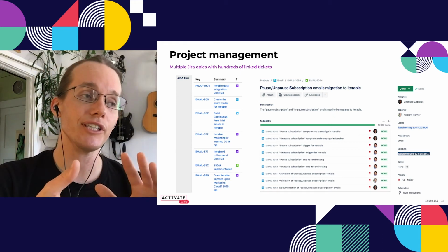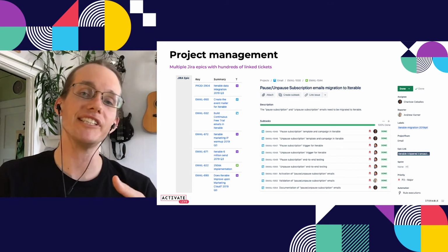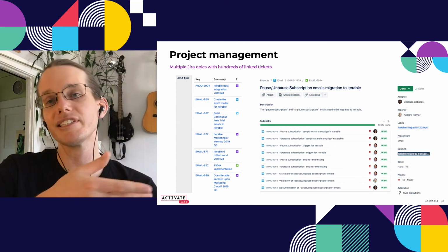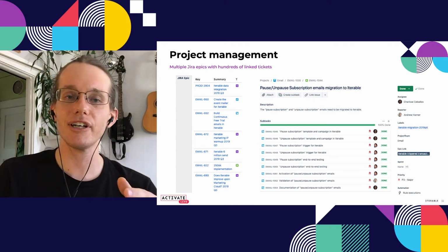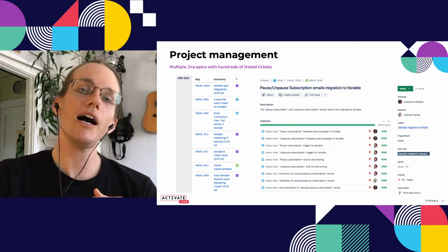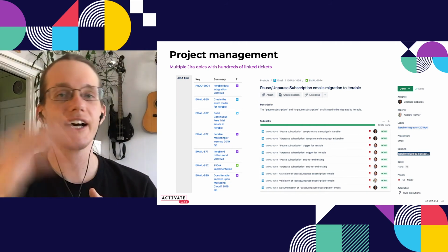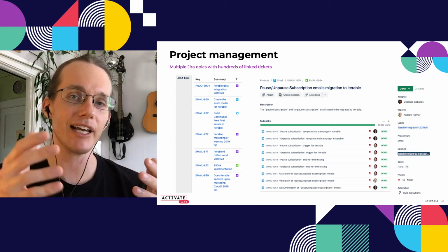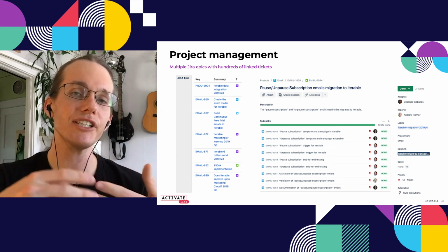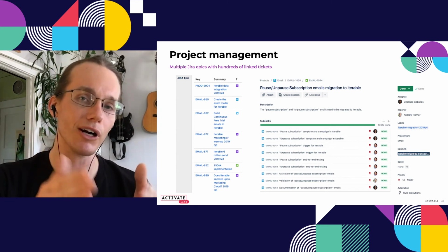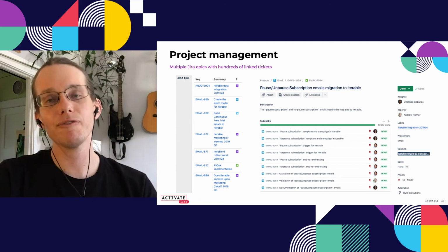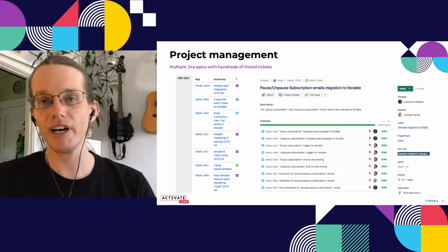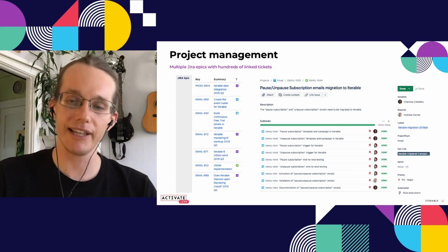A lot of times these were somewhat standard, like when we migrate an email, we always need to set up a campaign, we always need to set up the back end data, we always need to QA it. But having all of this ticketed out, linked to each other, and then documented in a single view in Confluence gave a really great high-level view. And again, I'm going to use that word again, align. It helped us align our team and keep everyone bought into our vision, and also maintain a narrow scope on our work so that we weren't off chasing this and that, but focusing on the key things that in the end rolled up to our evaluation of Iterable and the ultimate decision to migrate to them.